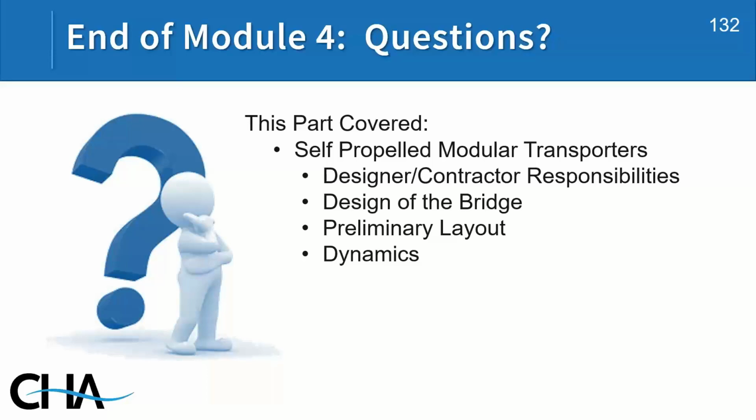You can reduce your construction management cost, and you can often offset the cost of the SPMTs by, say, taking a 24-month project and reducing it down to a 12-month project. That's 12 months of construction management that you can save on the back end. You pay more for the bid, but you save money on construction management. That's a whole other subject that there have been webinars on, so I'll just leave it at that.